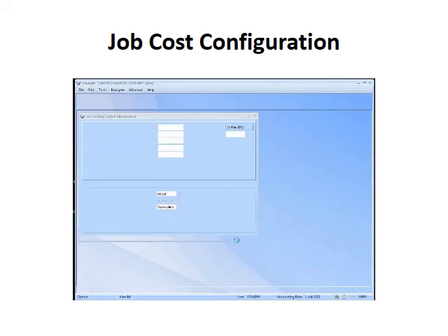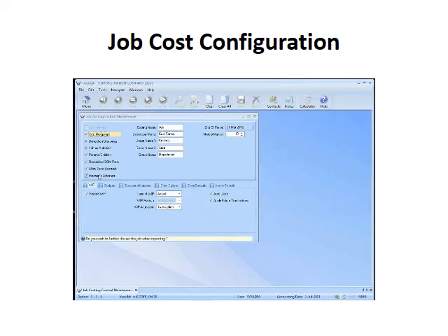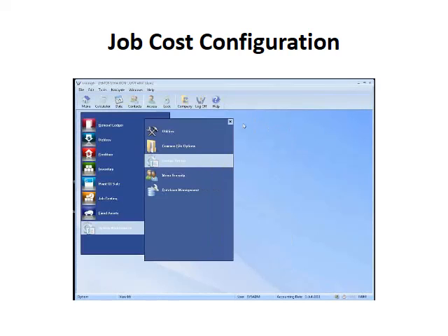I think that's something back here covering, yes, so all the rest of the things in that cost configuration area we'll cover as we do them. The one you will notice up the top here before we go is that you can actually turn off cost centers completely. I tend to very rarely turn them off because it's easier to leave it turned on and have at least one cost center on a job, because most people start off saying they don't need to break it down, but they seem to quickly change their minds. It's just easier to have it on to begin with. Alright.